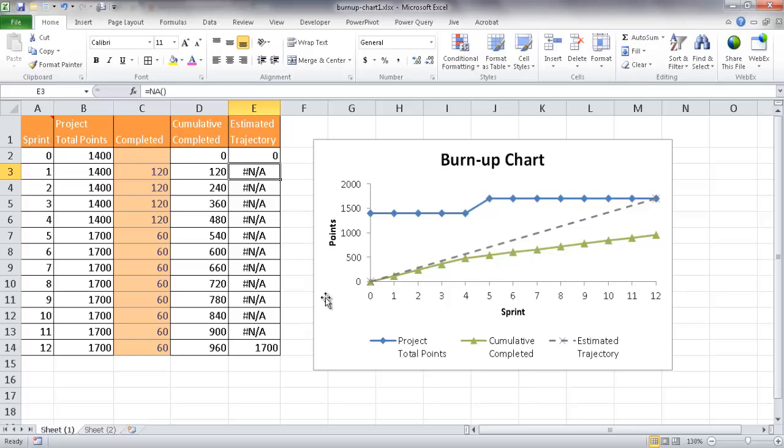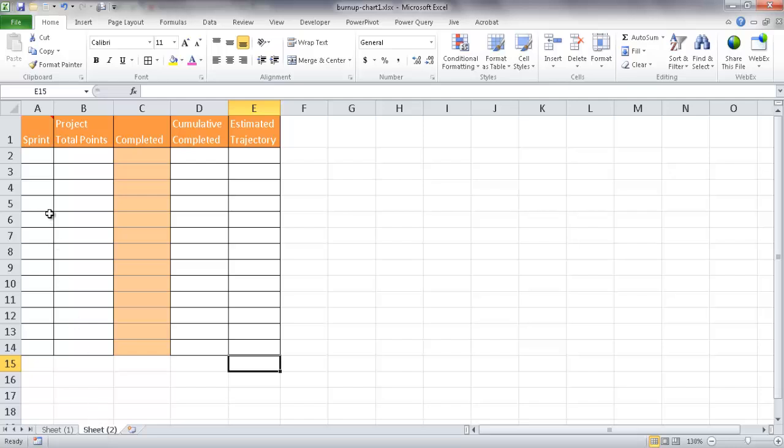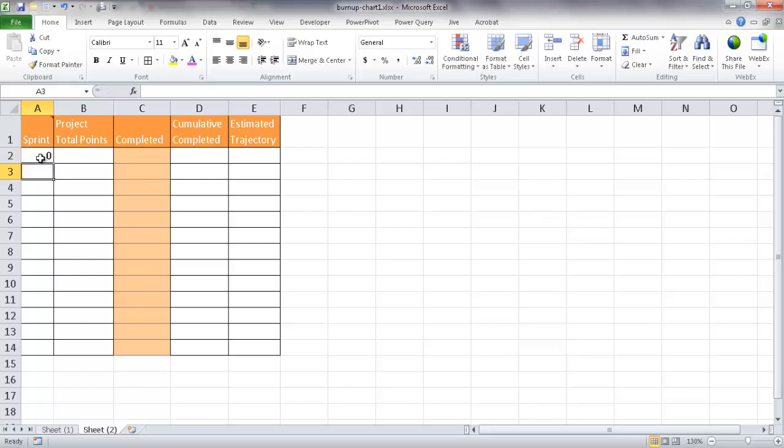So let's go through and see how we create this burn-up chart. So I'm going to go into the second sheet here. And for the sprint cycle, I'm going to pretend that there's going to be 12 sprint cycles from 0 to 12. And basically each sprint cycle generally is about 30 days. Now they can be determined by the project team, but generally 30 days.